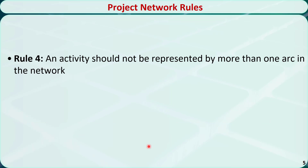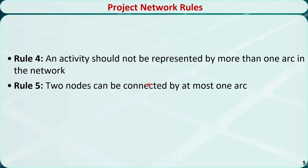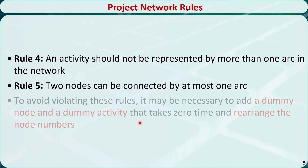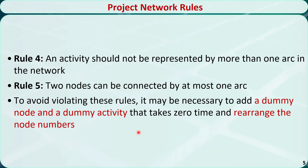Rule 4: an activity should be represented by only one arc in the network. Rule 5: two nodes should not be connected by more than one arc. To avoid violating these rules, it may be necessary to add a dummy node and a dummy activity that takes zero time, and rearrange the node numbers.